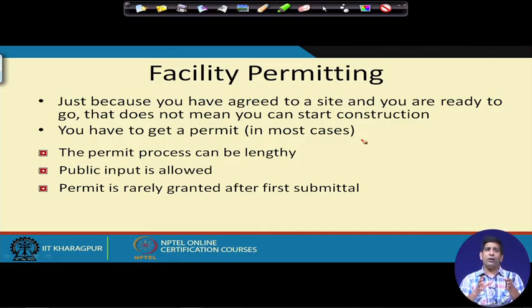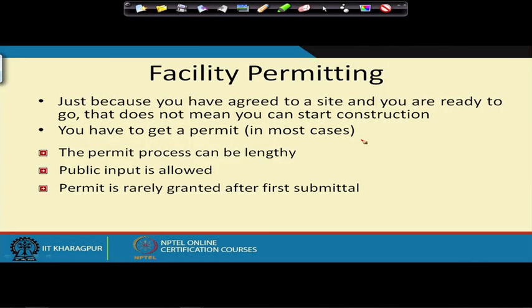As a part of the permit document, when you submit it, you do have to submit at least the preliminary design of that facility. That's important, and it's needed for that. Once you submit the permit, you may be asked certain questions, and you have to reply to them.